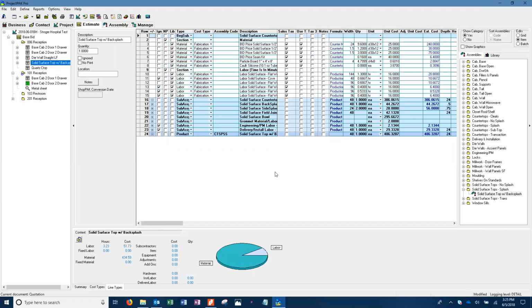And that's where you can see all the material that's going into this. And so it's 30 by 12. And so you know, okay, I've got to add something. It's a 12-foot piece, that's what I have to buy. Or it's a 10-foot piece, and I really only need a 4-foot piece. So what am I going to do? If I have a piece of scrap laying around, I could leave it this way, but if I don't, I've got to buy a full sheet. So you're going to need to pad that. You're going to drag in some more material and pad it so that you get a full sheet, right?